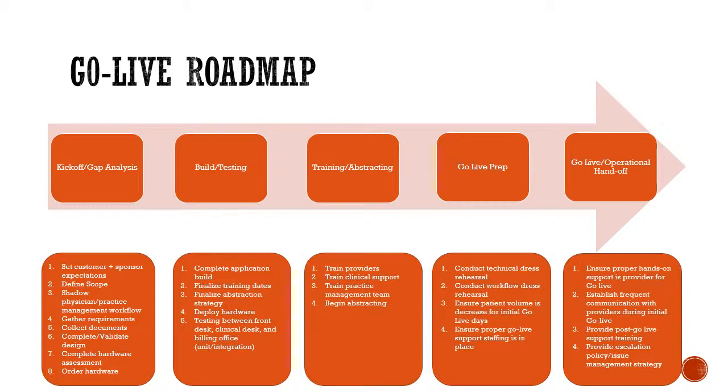And during this first phase, it's important to also do a hardware assessment and order the hardware so that you are ready to be engaged, and that this becomes less of an issue as the project progresses. In addition, one thing I didn't mention here is it's important that whoever is doing this kind of gap analysis work or looking at the shadowing should validate their findings with the clinical team, the practice management team, depending on the area of focus.